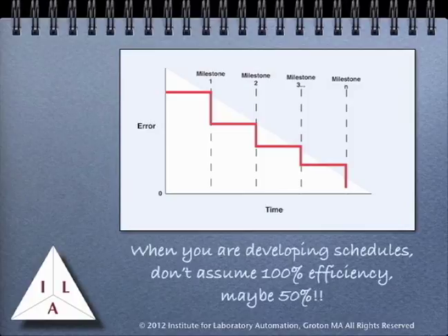Whatever number they give you, double it. That doesn't mean you don't trust them, but it does mean that you need to be realistic about expectations. People get sick, take vacations, quit, or for other reasons, don't work up to the potential they thought they might. There is one thing you need to be careful of, and that is padding the time schedule too much.